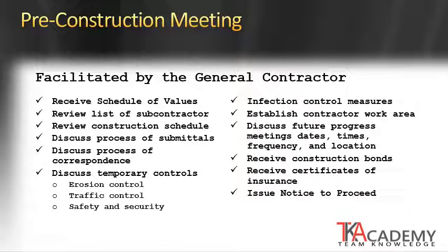Infection control measures. This is very important in most hospital or medical settings where you have to control the risk of infection from construction debris. Just to note that sometimes this includes noise, and when work can be performed without noise being problematic to operations or to a patient's comfort.